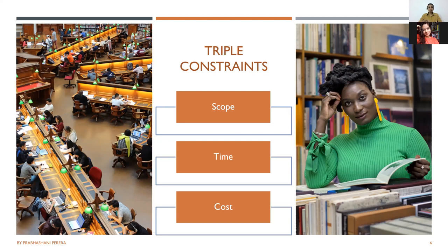If the project doesn't really make sense going out to the users without this particular scope, then you need to look at what are the constraints that you can change to take in that scope, right? So you might say, okay, if we take this new scope in, I might need another month to deliver the project. Or if I still need to meet that timeline with the additional scope, I need more budget so I can get more people.